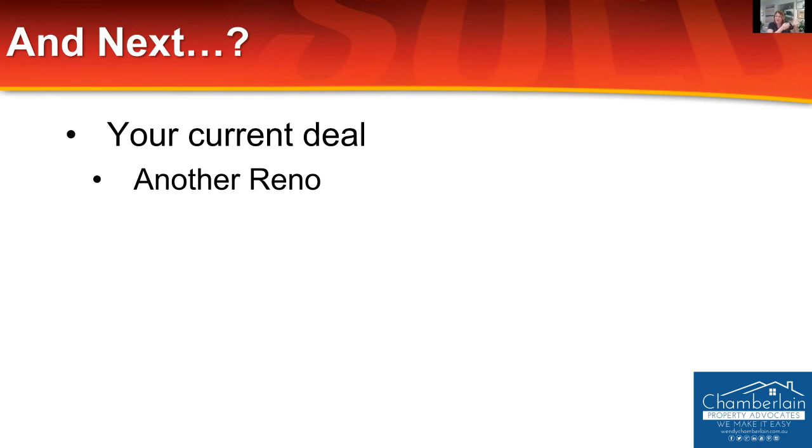We're going to be aiming at a professional couple, even a gay couple potentially, for this renovation that we're doing. It was a different Reno in Coburg. It was a young couple. So you really need to know who your end demographic is and what their budget is, because you need to know if you're buying for X and you need to be able to sell for Y, how much you need to put into the deal to make it work, because you have to have your set costs with a little bit of a buffer, because as you said, things always come up.